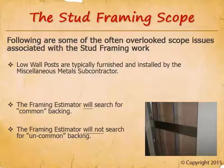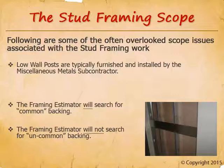My recommendation is for the estimator reviewing the project to flag everything that will require backing and put it on the scope sheet for framing bidders. It's okay to list common backing, but what you don't want to do is overlook uncommon backing. If you neglect to mention that interior expansion joints require backing, your framing subcontractor might submit a change order. Keep a backing log as you review the drawings and include it in the framer's scope of work.